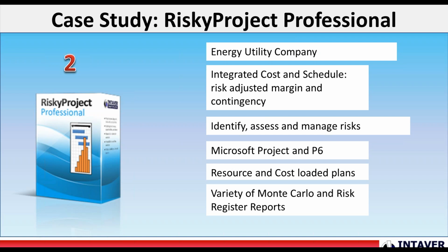Schedules are in Microsoft Project and P6. Again, Microsoft Project 2010 would be the earliest version they have. Depending on which group they're in, there's some variety. They could be in different places. Some are even using Primavera, but they can bring that data in as XML. They're using resource and some are cost-loaded plans. Not all of them are using the cost, but almost all of them are using resources to generate time-dependent costs. And they use a variety of Monte Carlo and risk register reports.